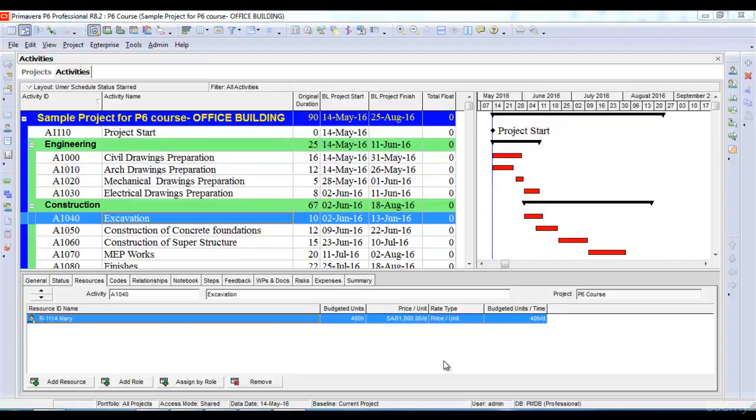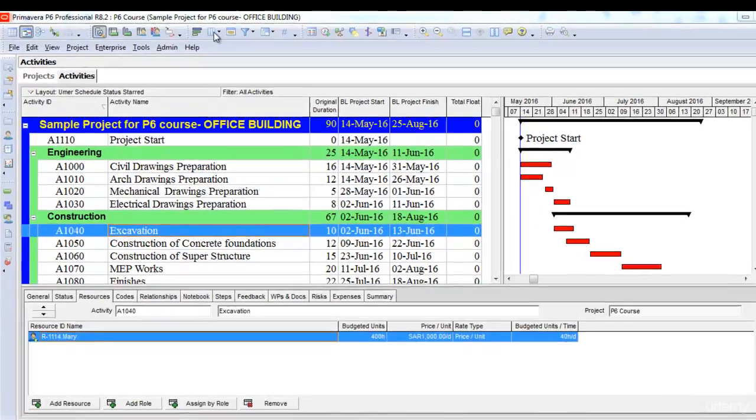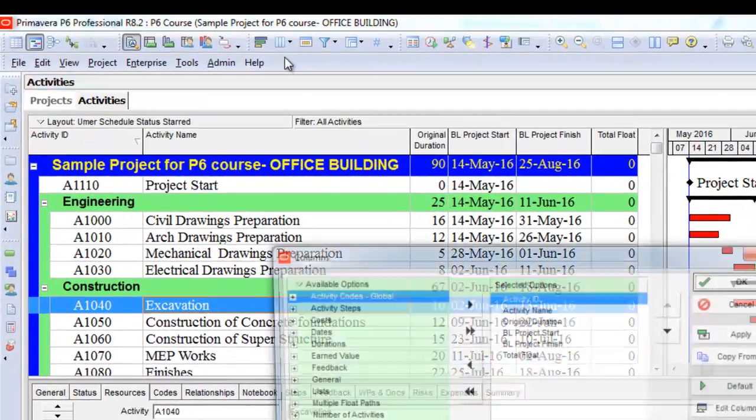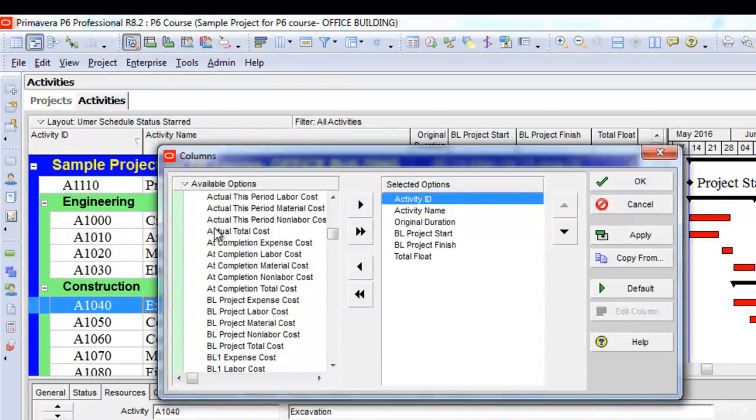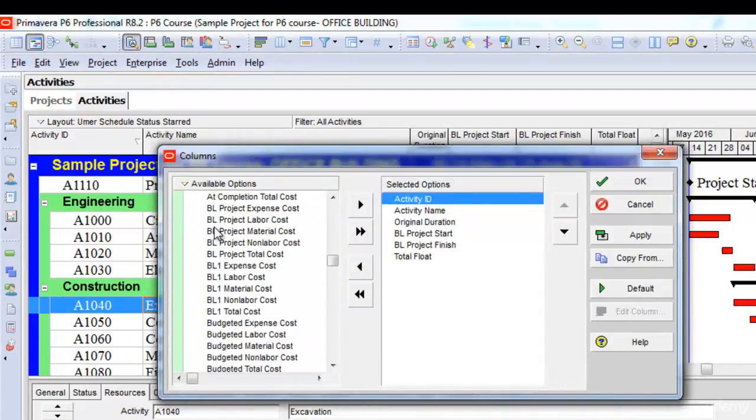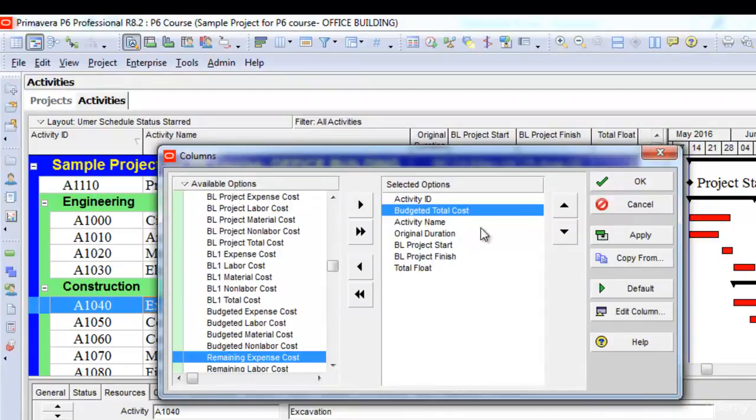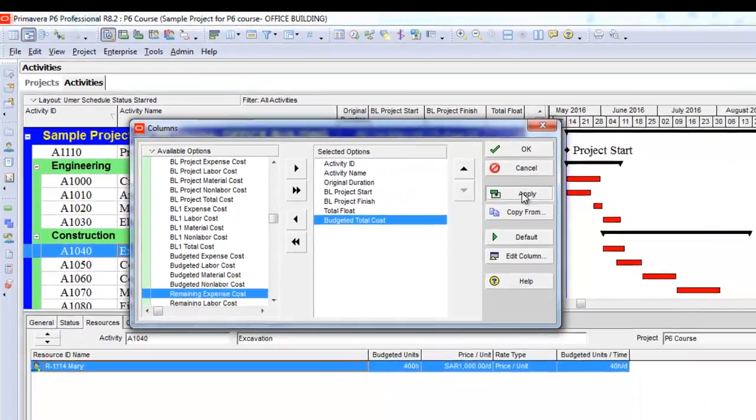In this lecture, we'll look at the cost of the project based on the resources we have assigned to them. To know the total budgeted cost of the project, I'll go to the columns menu and select customize. It will open a window here. I'll go to the costs option and select the budgeted total cost of my project.